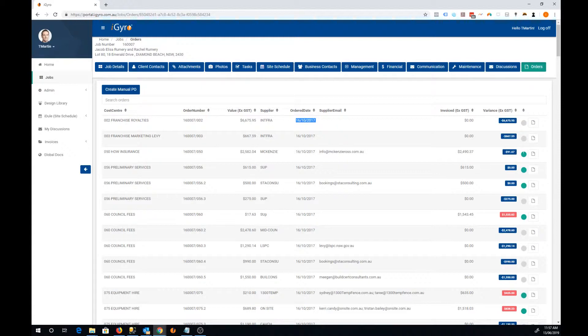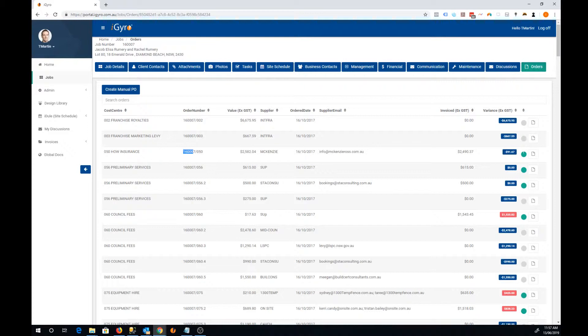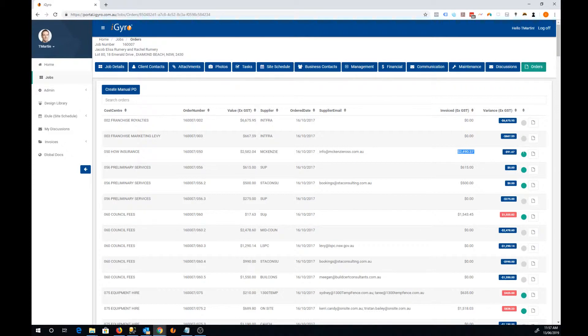This invoice column links up to the iGyro accounts payable system. Whenever an invoice comes into the system it's matched against an order number and this will show you the total of the invoices against that order number. For example here we've got an order for just over $2,500 worth of value and we've received invoices to the value of $2,490.